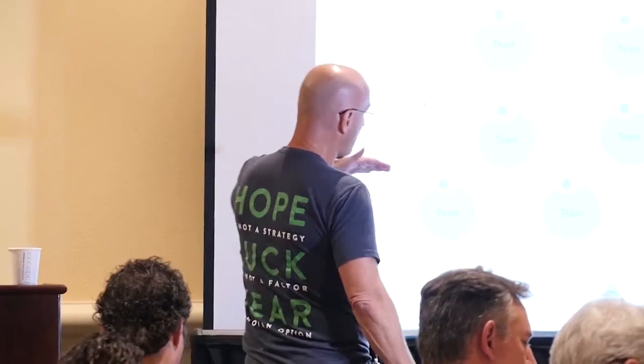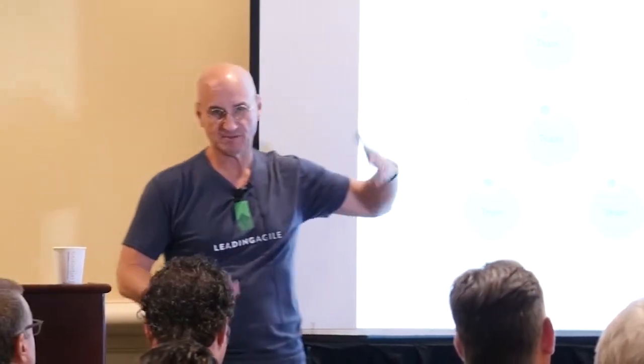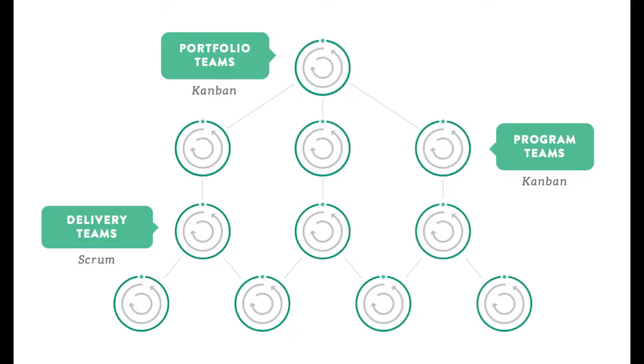And then something that tends to get left out oftentimes is how do we support governance and corporate audit and security and things like that. In most organizations that we work with, we end up creating probably most times a three-tiered structure, sometimes a fourth tier. And so we're creating a structure around either products or services. So at this bottom tier, this would represent your Scrum teams, the teams that have backlog. They're accountable for doing their work. They're demonstrating working tests of software frequently.